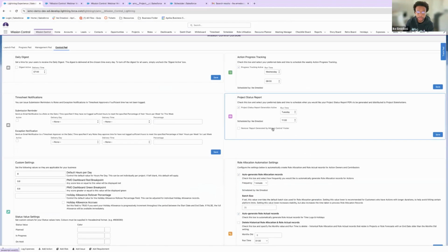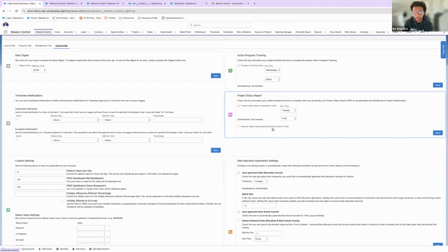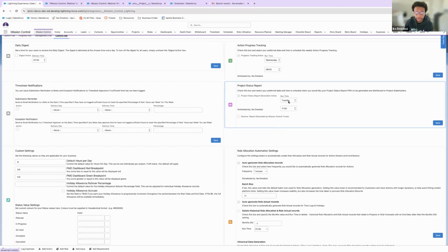But also you can leverage, and what you might like a little more, Vincent, is our project status report. You can have a weekly status report run at a specific time, on a specific day, and it's going to give you a better visual of what's going on with the project: the task completion percentages, any time logs, risks and issues, things of that nature. Basically, whatever you want to put in that project status report, you can send it out to those external partners. And these are some free options if they don't have licenses.